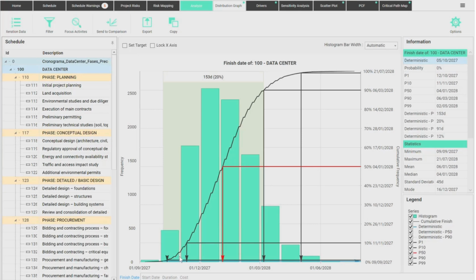Well, that's not going to happen. It's very, very, very unlikely. Most likely we'll finish around January, or to be more conservative, we should aim for March. There's a 90% chance that we finish up to early March. Only 10% chances that we slip, and then you could slip even 2 more months.